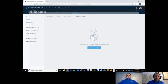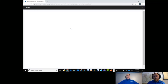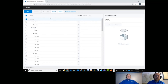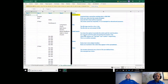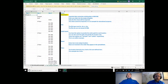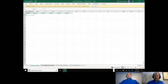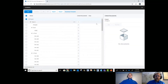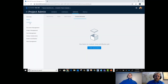Under Locations, this is to attribute issues to locations known within the document itself. You'll download a template here — it comes as a CSV file. It has good information on what to input, whether you want to use a four-tier outline, a three-tier, a two-tier, or an empty template that you can populate however you need. You can load that in and then utilize these locations as you're adding issues — you specify the location and link a document to it as well.